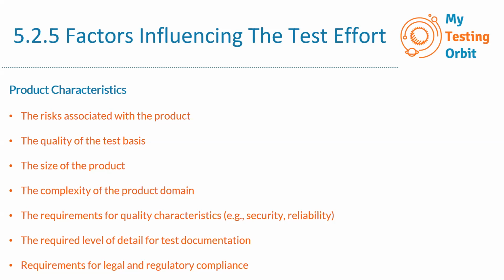Because if you have estimated that there are 10 test cases and it will take you 1 day, it's not a guarantee that all those test cases will pass in the first go, because no one can predict that. That's why it's always wise to have a buffer in your test effort estimation, where you include the time for retesting of fixes for defects discovered during testing.